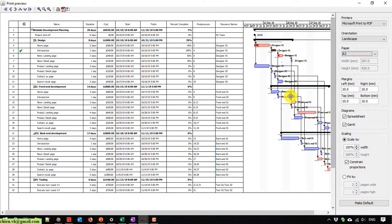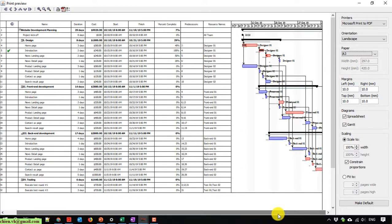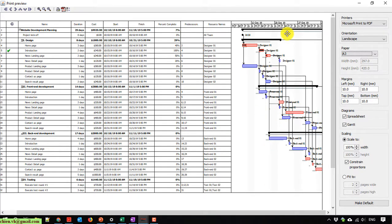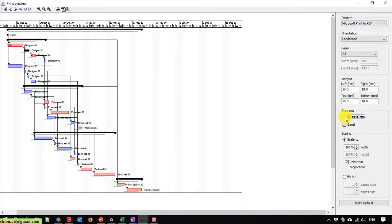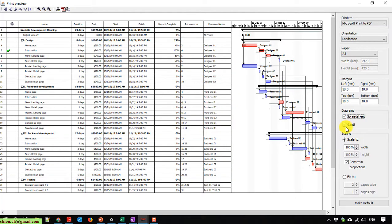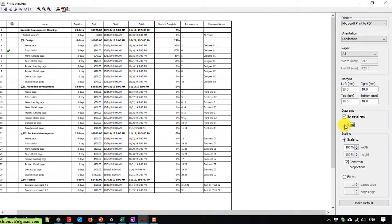But here it also includes the Gantt chart in the output. If I don't want to export the Gantt chart, how to do it? Take a look into the diagram section. It has two options: Spreadsheet and Gantt chart. If you uncheck this one, it only prints out the chart. Otherwise, when you uncheck the Gantt chart, the chart will disappear.